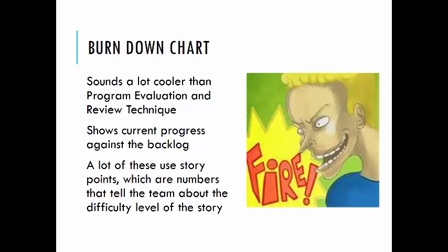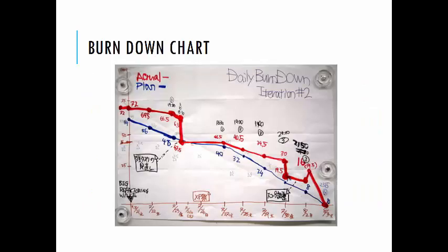Traditional project planning will use hours. Some Agile groups recommend using the Fibonacci numbers to classify story points. It's really up to you. If a story is bigger than reasonable, for example 21 story points when everything else is 1 or 2, then you need to break that story down into smaller stories so that it's manageable. When you get done, this is what a hand-drawn Burndown chart will look like, and you can see the dates on the bottom and the effort on the y-axis.